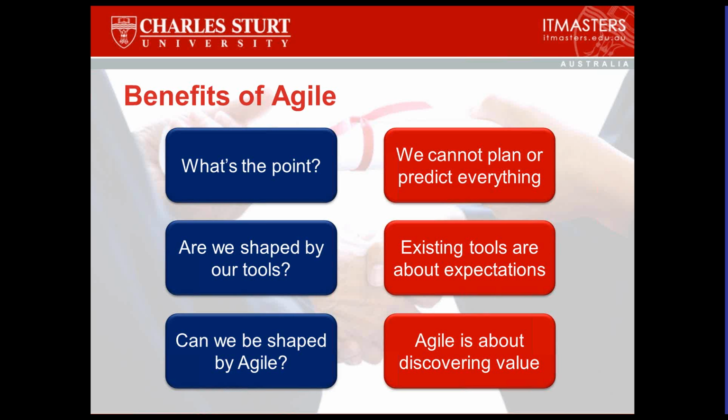Let's go back to the software example. You want to add another set of features? You want to make it available on a different operating system? You want to do something else like that? We can do that. There's always an opportunity cost. Let's talk about what's going to get taken off the project. Well, we can always talk about increasing the budget, but we'd start with the assumption that we're not going to talk about that first, at least. Maybe we never talk about that because there's no chance of an increased budget. Maybe there is. This is the difference that goes into this contract. The contract is covering how we're going to go about making sure value is delivered and is acceptable to the client incrementally rather than all at the end.